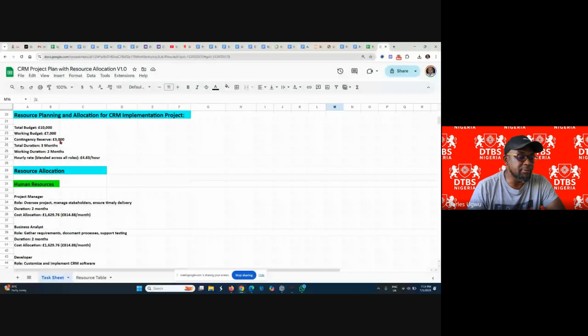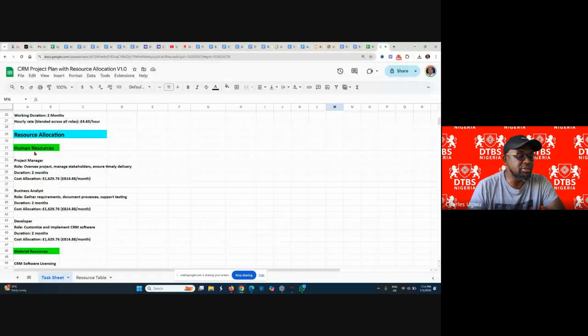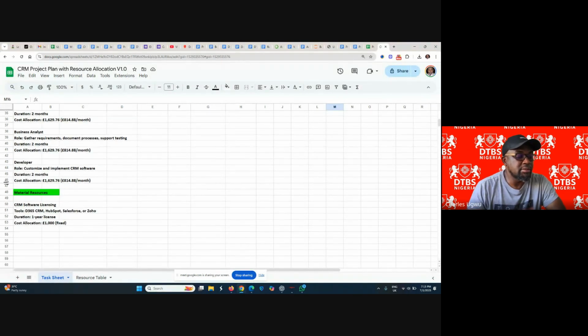If I must exceed 7,000, it must be a critical situation where we can fall back on the rest of the 3,000. So with this, we have human resources. Here we have project manager. This is what the project manager is meant to do, this is the duration, and this is what we plan to pay the project manager. This is business analyst. This is what the business analyst will be doing, for this duration, and this is what we plan to pay. And this is developer.